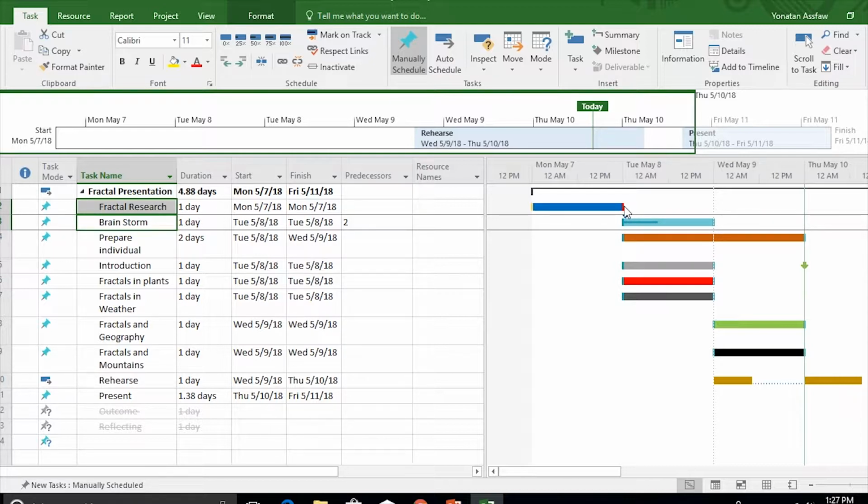on our Gantt chart. This is shown by the arrow here, and this arrow actually indicates that there is a finish to start relation. This is set by default. What this means is that this following task can't start before the preceding task finishes.